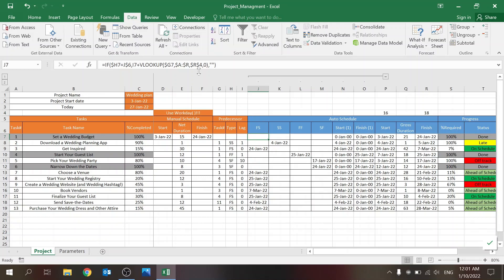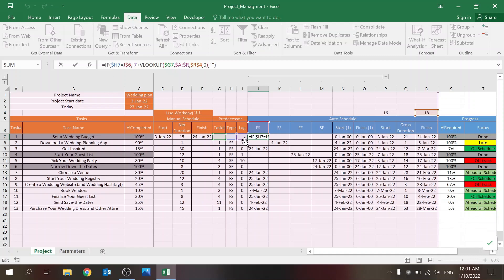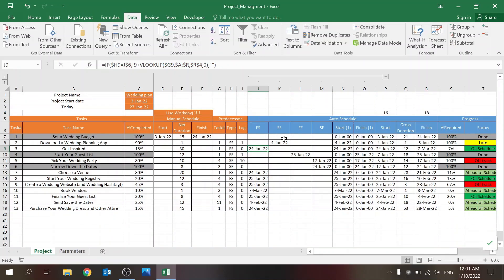Let's start with Finish-to-Start. If the type matches what's listed, I take the lag plus a VLOOKUP to find that task — looking through columns A to R — for the column that's supposed to be affecting the start time. Two other columns affect the finish time. This basically shows me what my start time should be based on the predecessor.